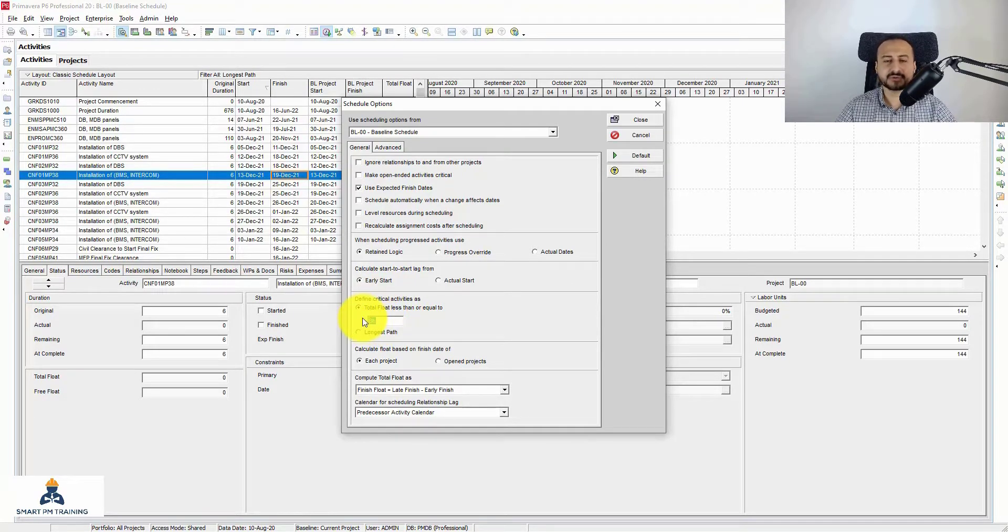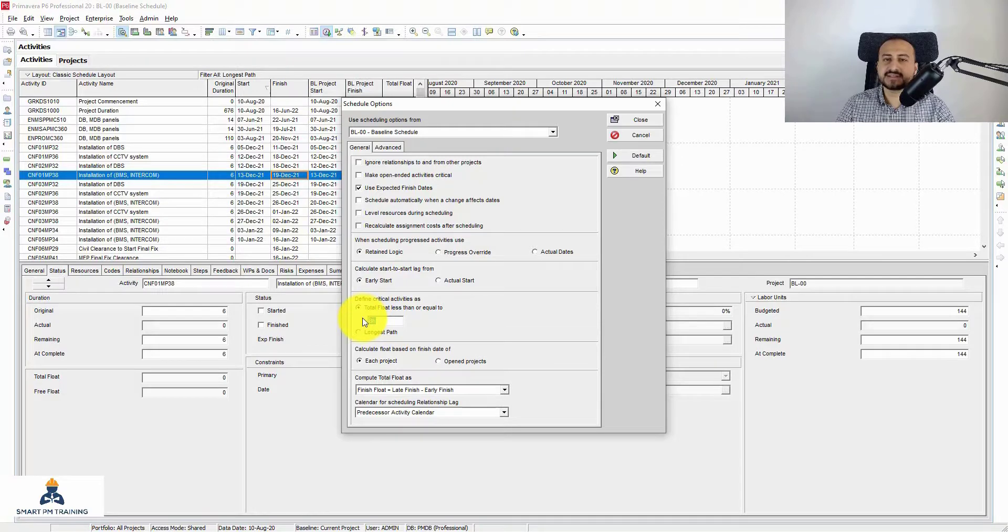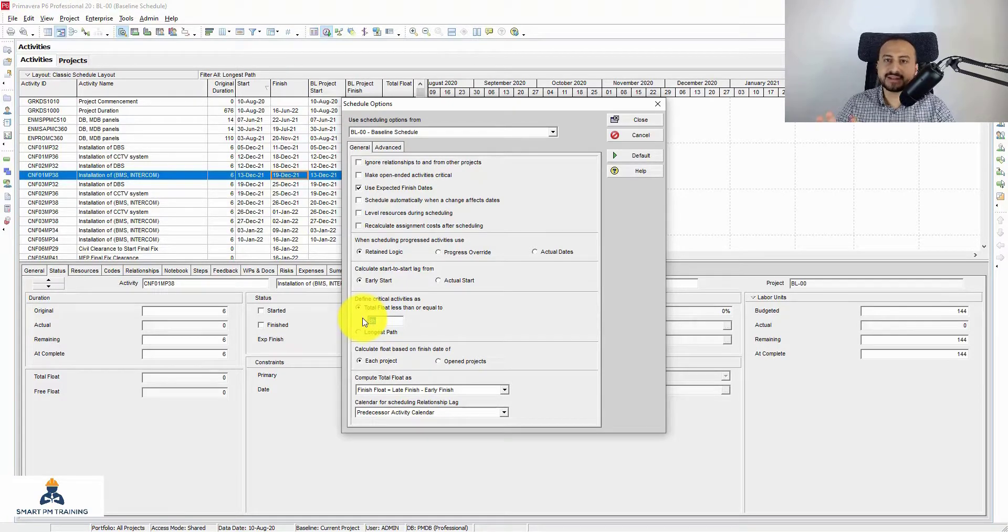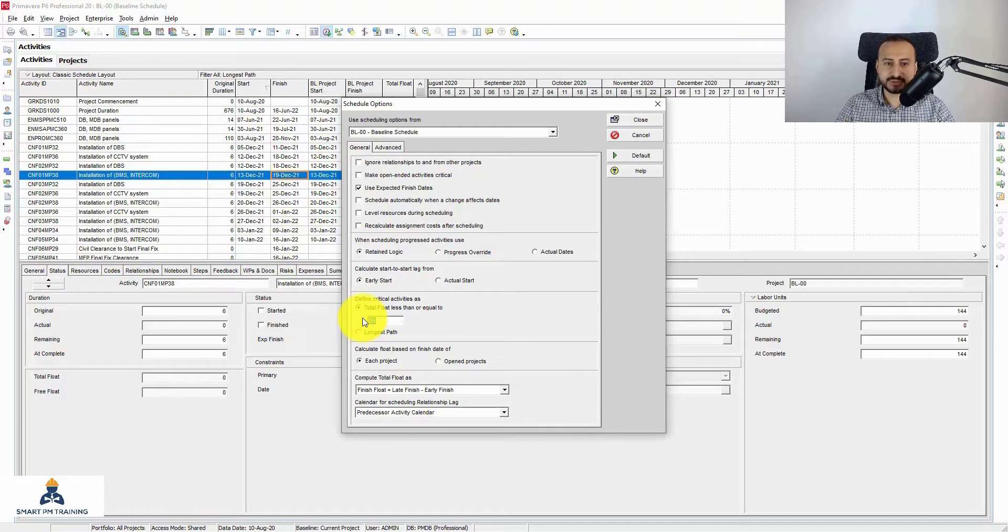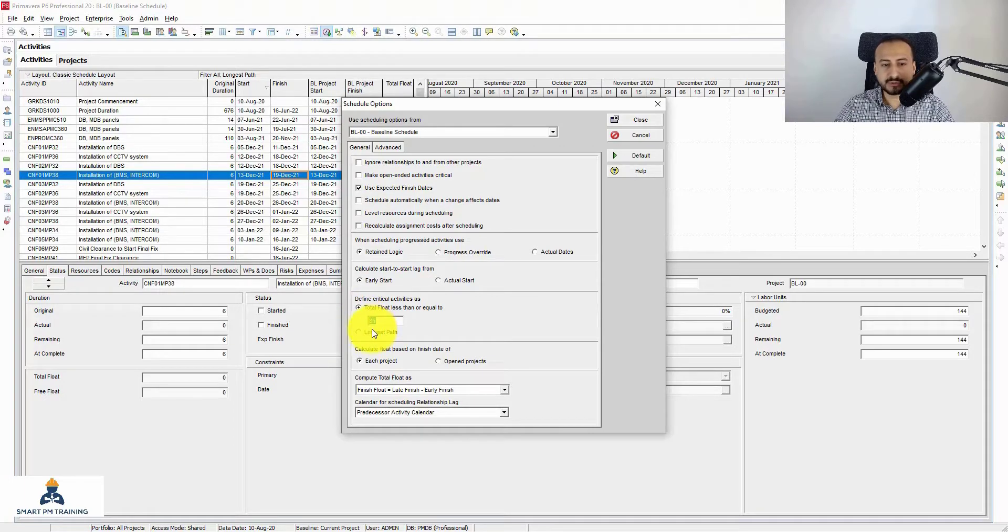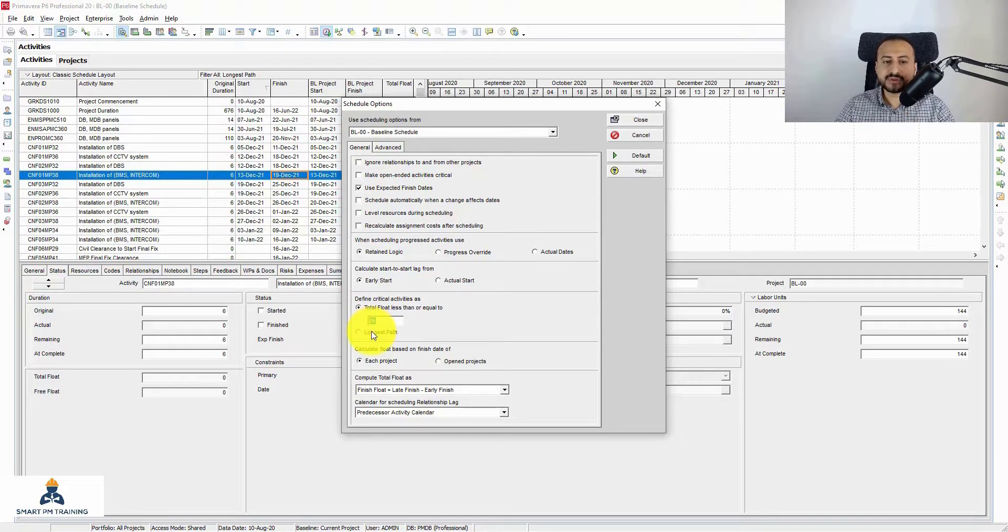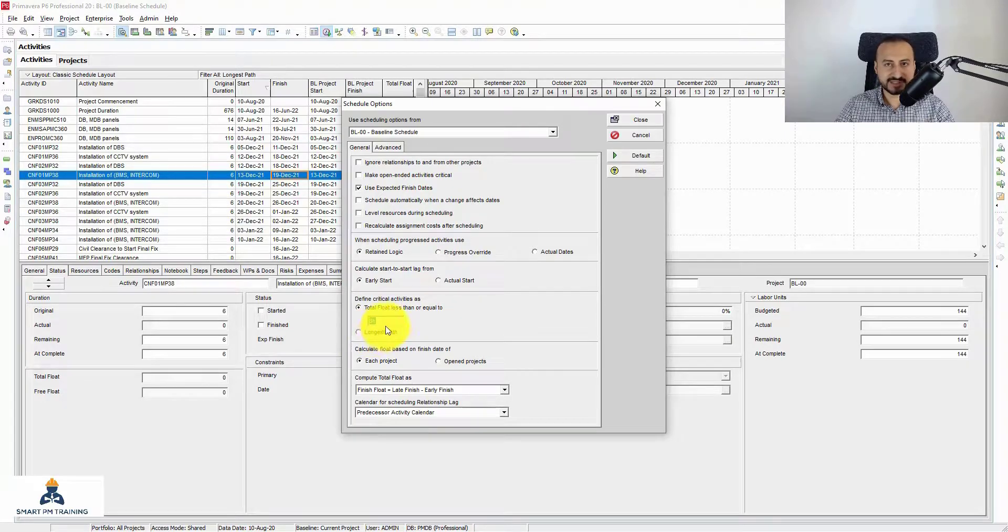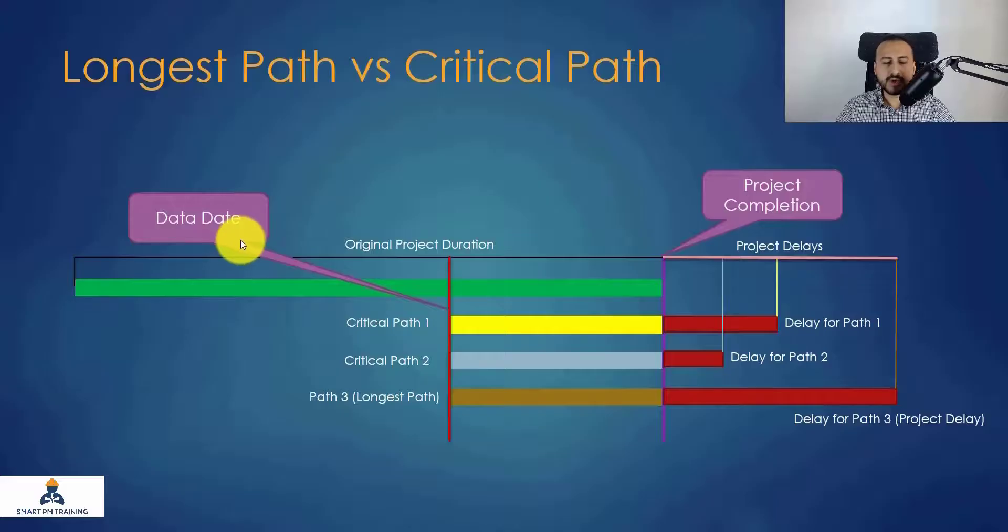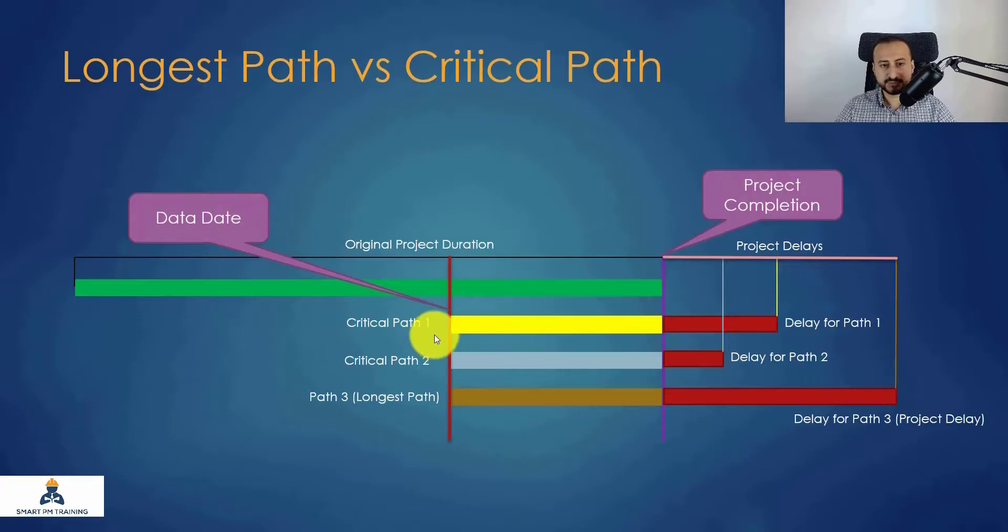But let's say it's zero days. We all know that critical activity is zero day total float for the longest path. So now we know that it is different, they are not the same. Now I'm going to explain the difference between both.